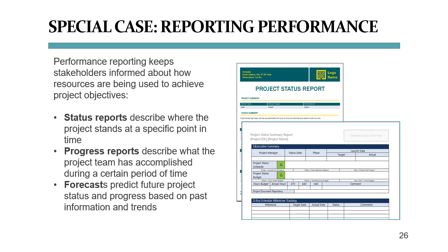As you can see, project status reports are full of metrics, and these metrics have different formats. There are text fields, date fields, stoplight colors, dollar figures for budget, worked hours planned versus actual, then ETC, EAC, variance at completion, or whatever other earned value information stakeholders need to know. And then the key milestone dates, with a comparison of planned versus actual and any explanations if milestones were missed. And we haven't even talked about the risks yet.